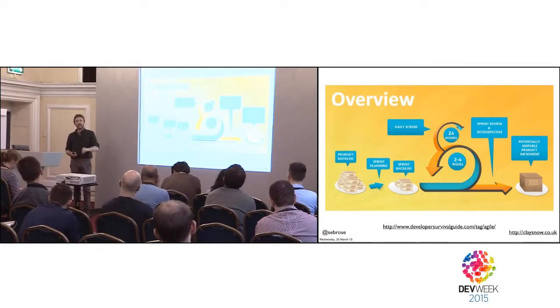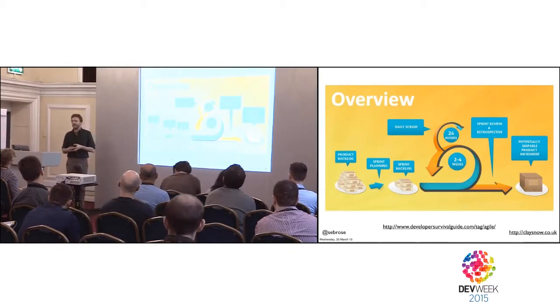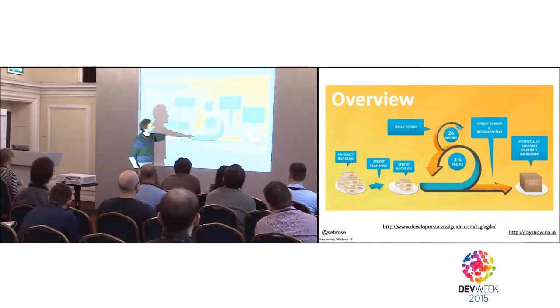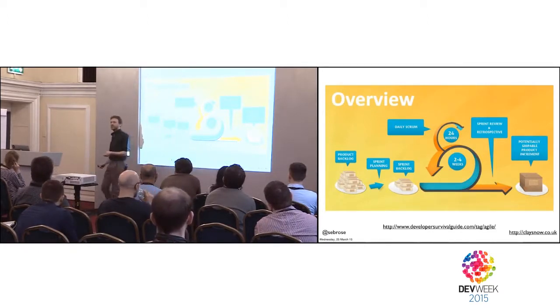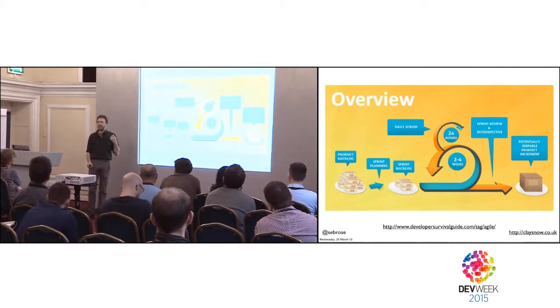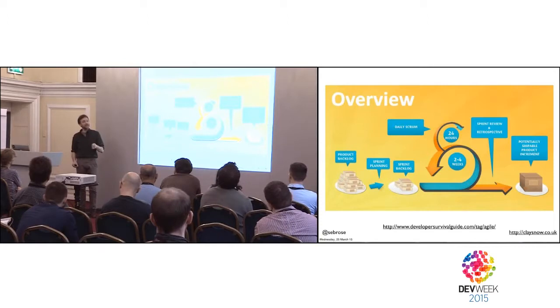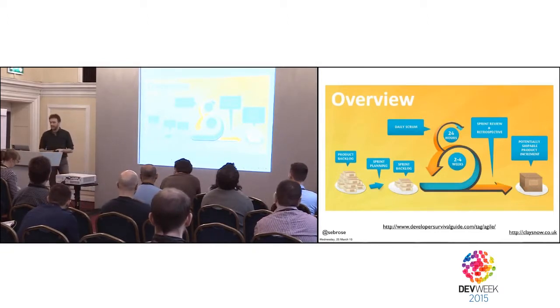And the important thing is to understand that you have to fit it into the process you are running now. Because if there's one thing that Kanban teaches us, it's that trying to do large wholesale changes of a whole development organization like that is almost bound to fail. So it's really good to start with where you are now and make small changes and move towards where you want to go. And use this thing to help guide you. So if you make a small change and it screws things up, well, undo it and try something else. If you make a small change and it makes things better, then think about doing more of it or doing something that will complement it. And this is the feedback loop that helps us learn and implement better processes.